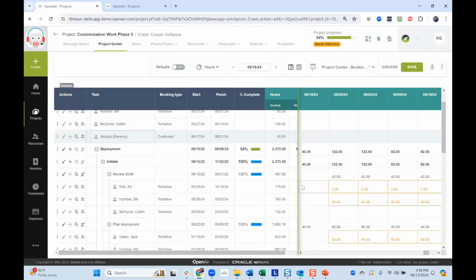Now I can add those bookings here, and I can update my booking type and then save this, and now I've saved the record. So I've been able to create a single booking over a starting period. And then as the booking becomes named and as the project is executed, now I can use the power of the worksheet to drill into each period and update the bookings based on the expected actual burn of those hours.